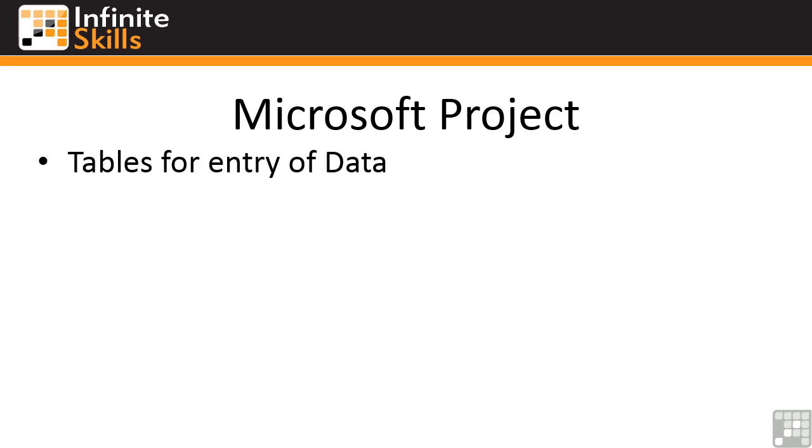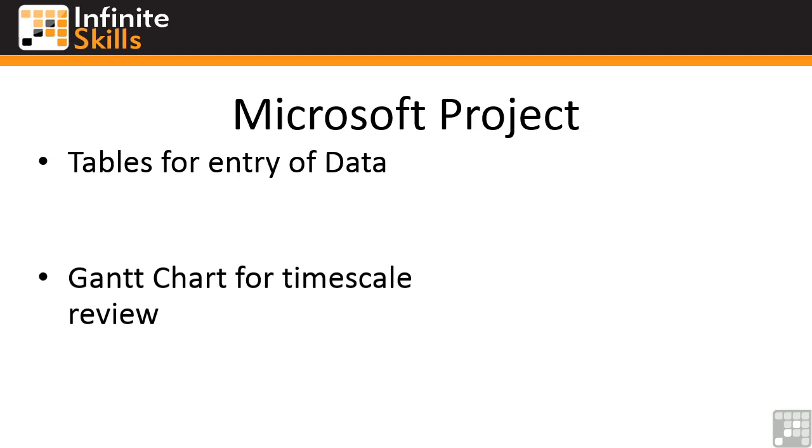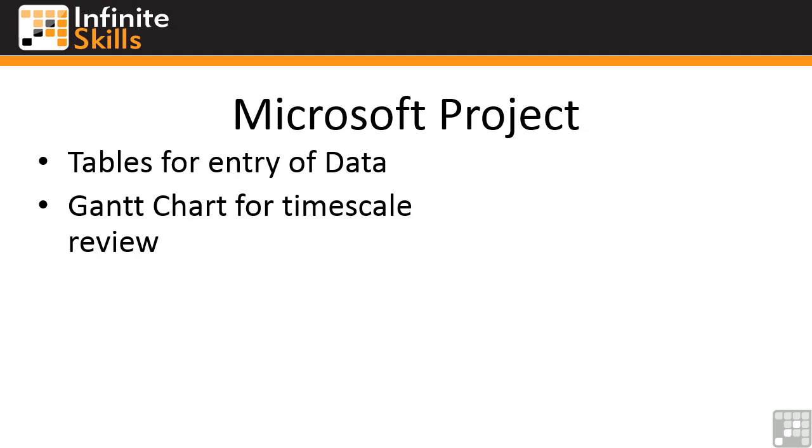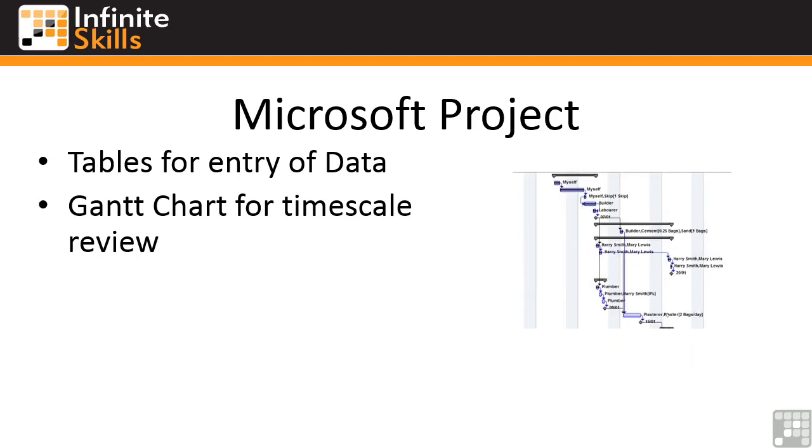Now in Microsoft Project 2013, we have a number of tables for data entry. These tables pretty much mimic Excel. So as far as getting up to speed and being able to use the software is concerned, most people will hit the ground running. There is a Gantt chart for timescale review, which is built by itself. And we've got a little screenshot there. You don't actually build the Gantt chart, it builds itself from the data you enter in the data entry tables.